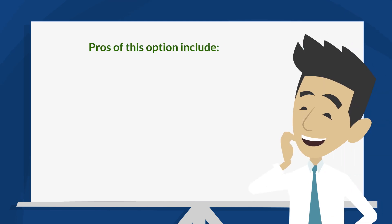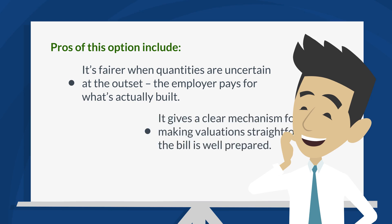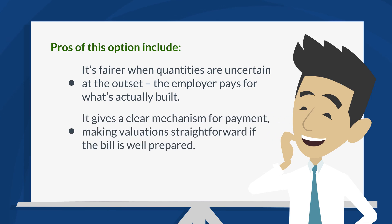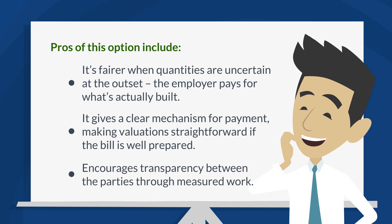Pros to this option include: it's fairer when quantities are uncertain at the outset; the employer pays for what's actually built; it gives a clear mechanism for payment, making valuation straightforward if the bill is well prepared; and it encourages transparency between parties through measured work.